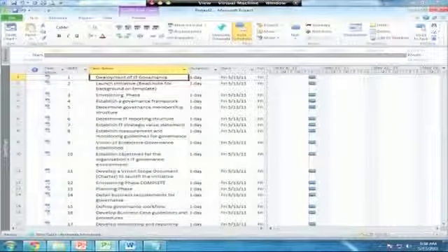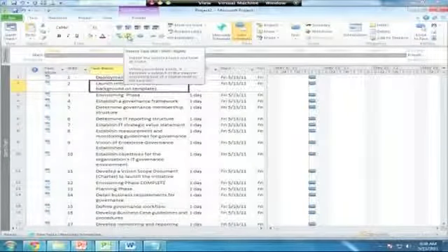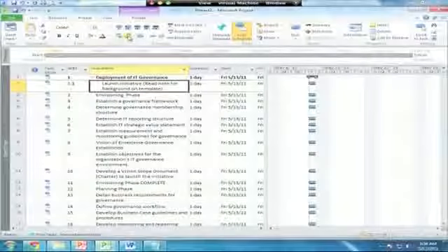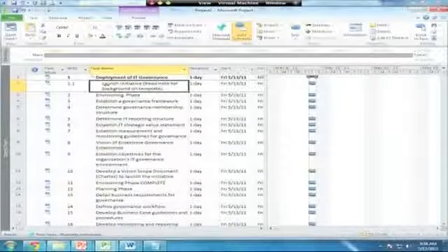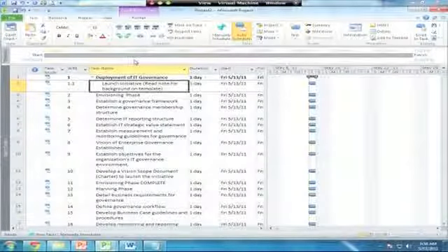The reason I add this in there is so that you can see that as I now work with the indent and outdent buttons, this basically treats it like an outline. If you're doing a written outline view of a WBS, this is how you'd indent these lines to show how they fit together. Sorry, I get all these pop-ups. I hope that doesn't bug you too much.